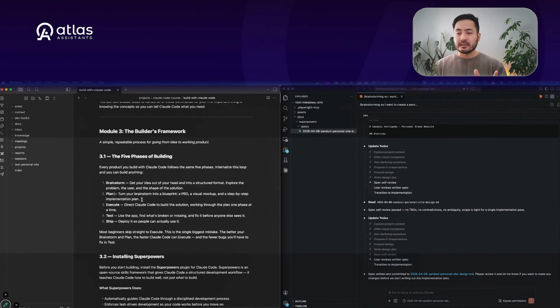All right, and you guys probably have seen this. If you go straight from a brief to execution and you're not sure what the tasks are, who does what, right, then we can't really hold the team accountable. All right, and then execution becomes fragmented and all over the place. It's going to be the same when it comes to development. All right, so the two key files you want to get to before you execute anything is first the PRD and then the implementation plan.